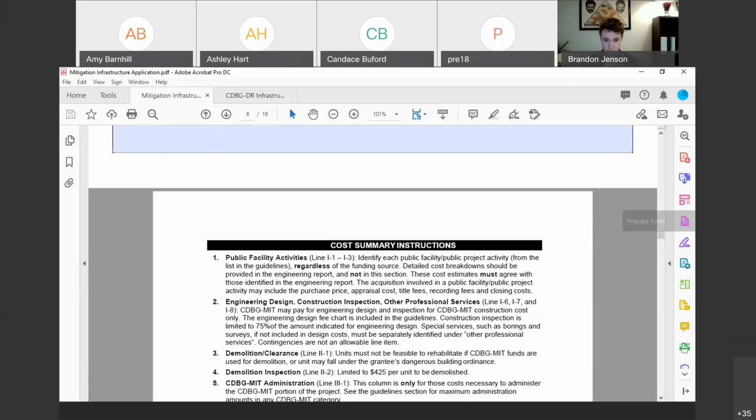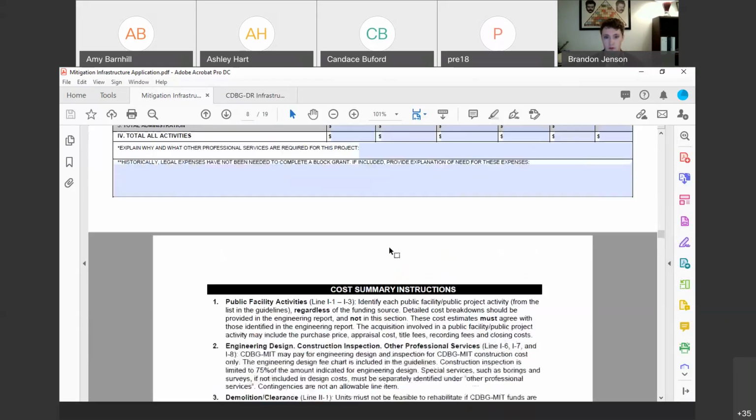It's a good question. ADC questions are not mine. But I feel like as long as they align within reason, we wouldn't necessarily make them go out and resubmit. If it's going to be a substantial disagreement in the cost, I would say just provide some explanation either in the PER, or could you include an addendum from the city just saying, in addition to these costs estimated by the engineering firm, we estimate these additional costs under these line items for activity delivery?